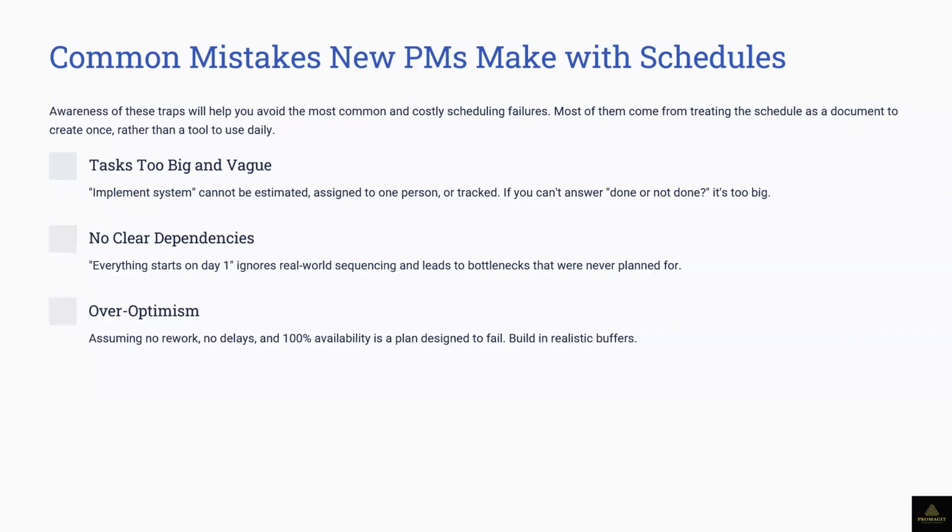I've worked on projects. In my company, there's a project we lost some 2-3 months ago for this scenario that I just painted for you. The client wants something to finish at a particular date, and based on the schedule we have built and because of the resources we have, we said it's going to last for this particular period. But the client knows that we can run certain things in parallel. They are activities that don't depend on each other. You can run them in parallel. But if we need to get additional resources, it's going to cost us more. That means we're going to bring new people in, and it's going to cost us more.